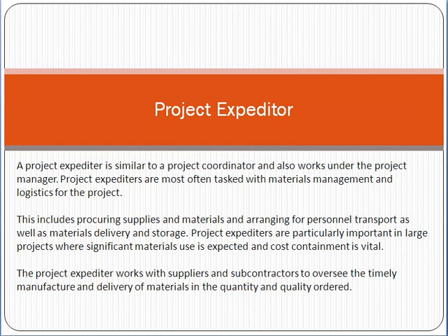Remember again, he is dealing with logistics and all those things, but he is not a decision maker. This includes procuring supplies and material, arranging for personnel transport, as well as material delivery and storage. Project expediters are particularly important in large projects where significant material use is expected and cost containment is vital. So friend, all those things are very important.